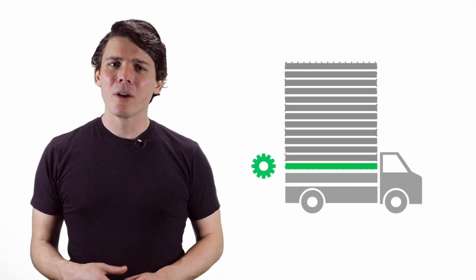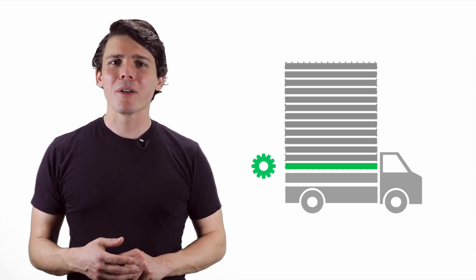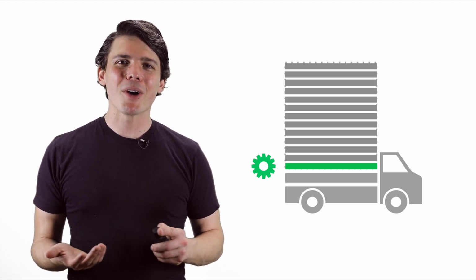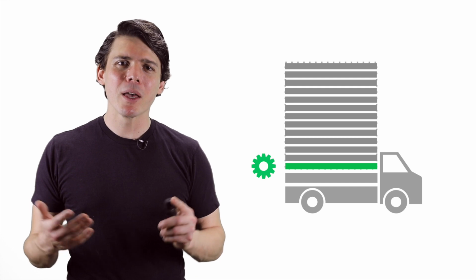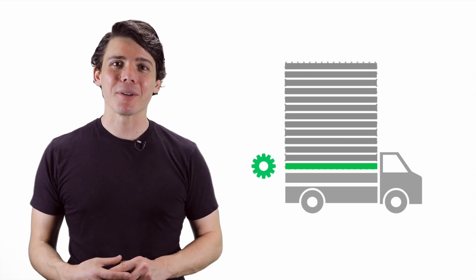Sixth, the team should discuss how it will complete the items in the backlog. This typically takes about half the time allotted for sprint planning, so be sure to allow enough time for it. Starting at the top of your sprint backlog, the development team will discuss each item and decide how it will deliver this functionality in the sprint.